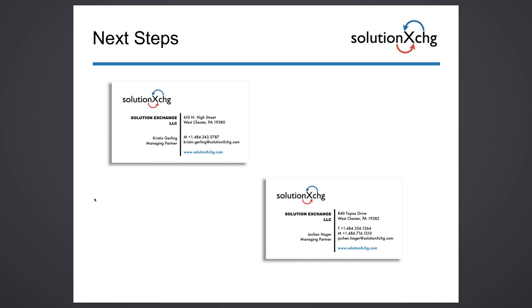We can set that up in addition to the migration server, and then we can just pump a few thousand documents from your existing archive into that mock KGS content server archive, and that can be done from a test environment. We can go against your production archive without any impact on end users, without any impact on your SAP systems, and pump a few thousand documents.